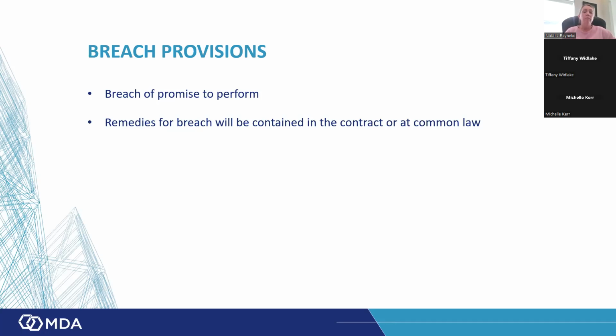The breach provisions may even relate to, for example, late payments. So if we paid late, the employer is in breach. How do we access the remedy under the contract due to that breach? That is one that is often deleted. So the waiver of the lien, the deletion of the right to suspend the work when the employer is in breach of the payment provisions.